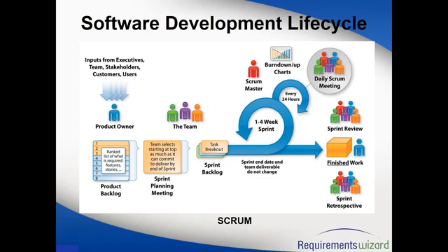It's like a virtual, or you know, if I give you a big cardboard box, and I tell you, okay, let me enter all my requirements in. I write all my requirements on pieces of paper, like 50 requirements, 50 separate chits in that box. So that cardboard box is my backlog, the product backlog, where I have all my 50 requirements, and the product owner will be telling me which ones are important and we should do first, and which ones are not that important, which we can do in the next iteration, not sprint.